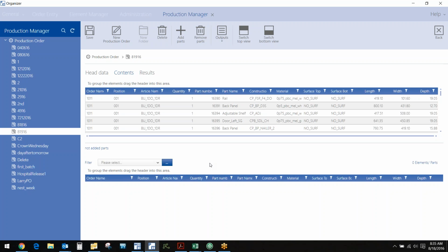And so then in the system, the function is we have lead times, we have whatever it is, and so it looks at your requirements and when you need to order, and you push a button and it generates POs out to the vendors. Sometimes it's a multi-step process because in a lot of cases, because things are custom enough, for the non-negotiated items, we're sending out an RFQ.